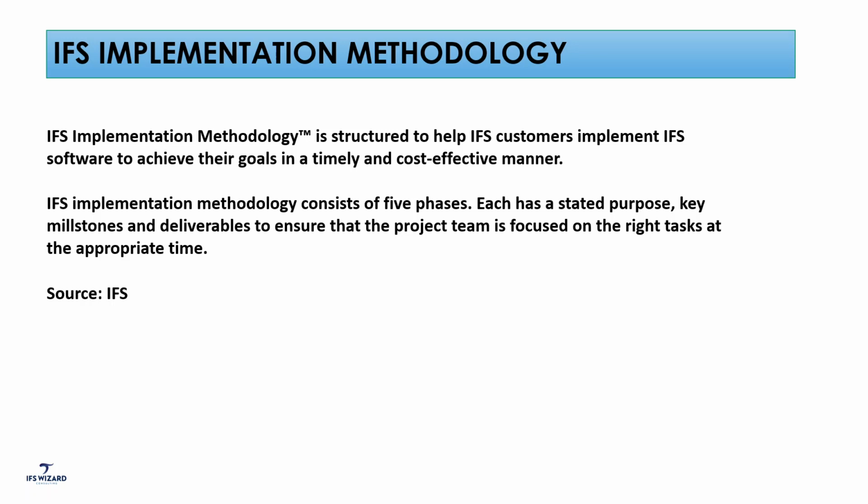Each phase has a status, purpose, key milestones, and deliverables. As consultants, we have deliverables in each phase. For example, at the end of the initiation phase or the confirm prototype phase, we give you the book of rules, which back in the days we used to call the SDD, or the solution definition document. So we give you a document where, okay, this is going to be your solution.